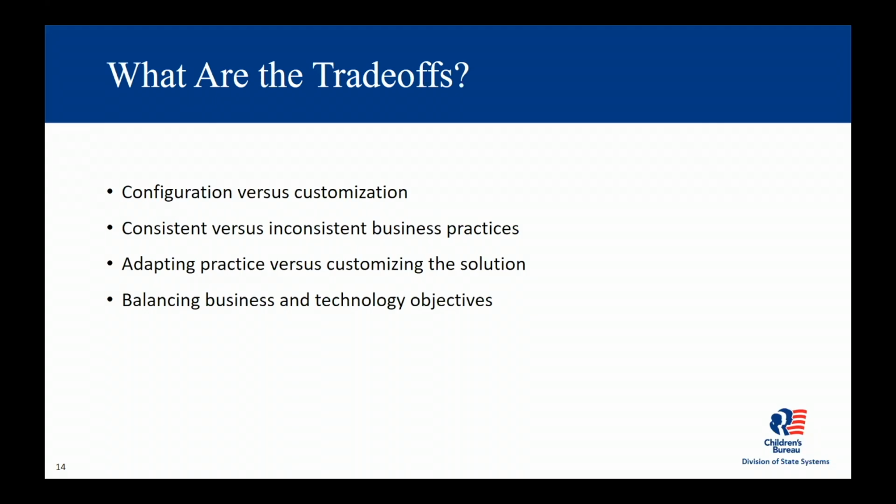If the low-code solution is new to the agency, then they should consider independent verification and validation, IV&V services. IV&V activities could include a review of the agency's readiness to support the project and determine what preparations, positions, and tools need to be in place to be successful.